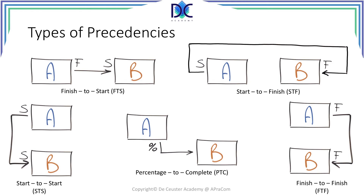Although we will only work with the finish-to-start relationship in this course, I will also define the other relationships. The second one is the start-to-start relationship: task B can only start when task A started. A finish-to-finish relationship means that task B can only finish when task A is finished. A start-to-finish means that task B can only finish when activity A starts. For the sake of this course and some practical applications, I also added a percentage-to-complete relationship.